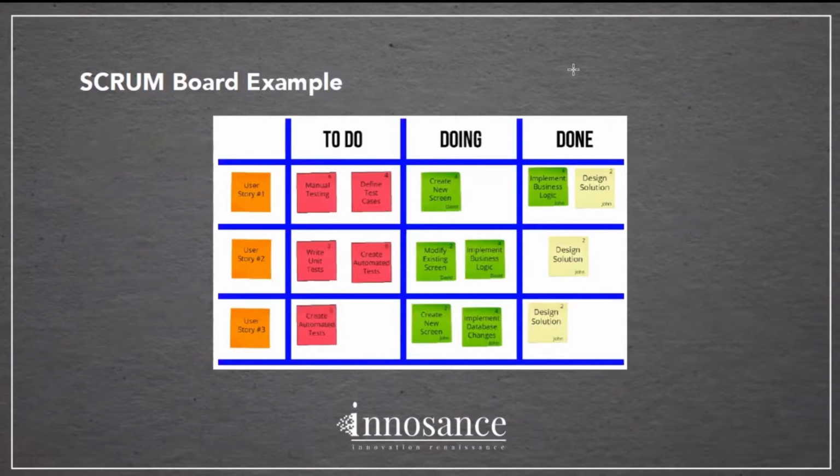So how are we going to do that? We have to prioritize our product backlog items. And we have to start working first on the prioritized items in the first sprint. So how do we prioritize that? In a sprint planning meeting, okay? The outcome of the sprint planning meeting is called the sprint backlog. So we will have a backlog list that includes all the items that we want to deliver by the end of that sprint. And we are going to do this for each sprint.